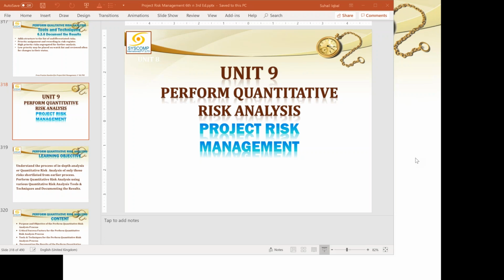Right. Now let us only talk about the quantitative risks. These 200 risks can behave in different manners. First of all, apparently what I can see is that these 200 risks will all occur. This is one possibility. All of these risks will occur at different points in the life of the project. So if I do nothing, how much will be the damage? Whatever is the cumulative effect of all the risks is my overall risk, right? Now I have to see this overall risk. How bad is it? How much is it out of the range I had specified from the perspective of time or cost or scope or quality, and as much as it is beyond the limit, outside of the threshold, that much I need to treat.